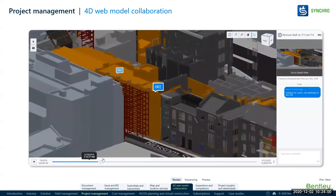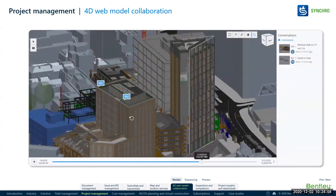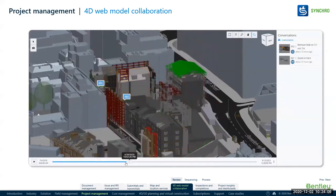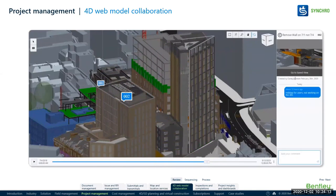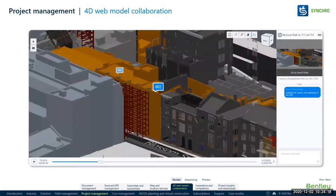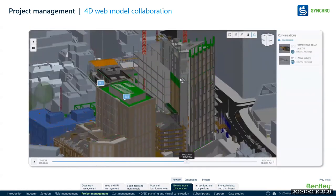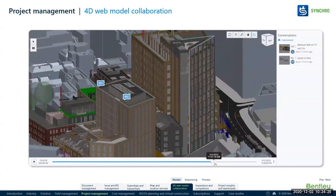I can navigate around the model and zoom in and rotate while the construction sequence is going on. When I capture my comments, it captures where they are in the model, but it also importantly captures when they occur. So if I'm the project manager and I can see that somebody's raised an issue, when I click on that issue in my web browser, it takes me to the point in time when that issue occurs at the right place in the model.